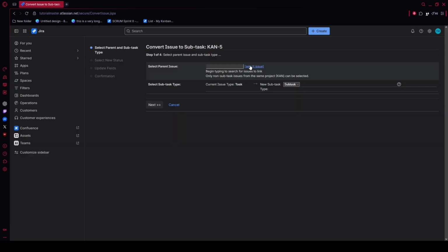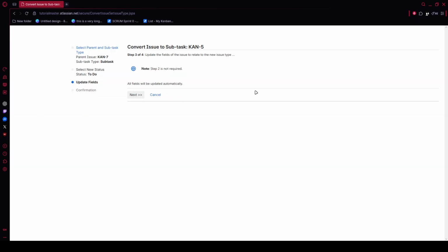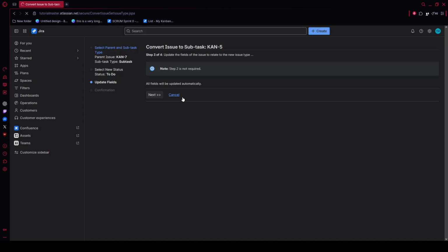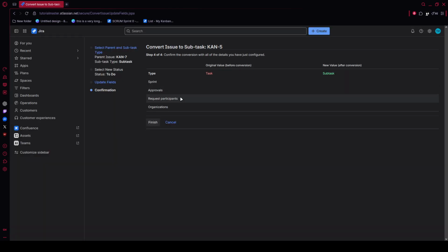There's also a faster shortcut if you're moving quickly through multiple issues. At the top of the subtask screen, near the current parent reference, you may see a small drop-down chevron next to the existing parent. Click that chevron, then type or choose the new parent issue from the inline selector. Press enter, and Jira will immediately reassign the subtask without interrupting your flow.